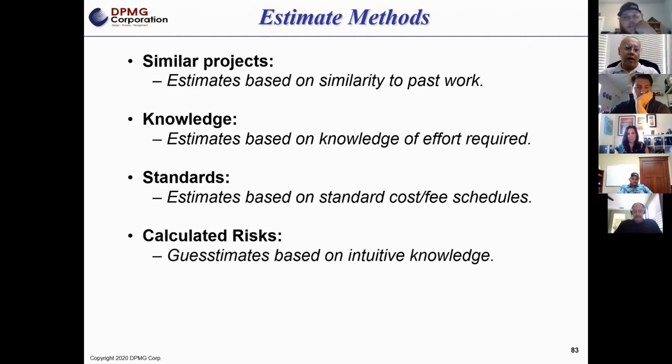You can do a calculated risk. In other words, you can do an estimate and then apply some factor. This is something I've seen a lot in construction. They say, well, it's a fee, and our factor is, we always throw a factor of 26% on there because that's what we think we've been operating. So they take a number and multiply it by 1.26. Okay, that's a guesstimate with some gut feel, right? So you can do that. It's a calculated one. Now, if you take the PMI course, they actually have specific formulas. Quite frankly, those formulas versus gut feel really are not that different.